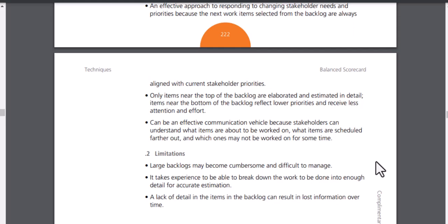Also, you cannot accurately estimate any user story. Some user stories can seem very easy when you write the requirement, but when the developer starts developing that user story, only then will you find out how difficult it is or how much work there is. So an 8-pointer can become a 13-pointer user story, and a 5-pointer can become an 8-pointer.